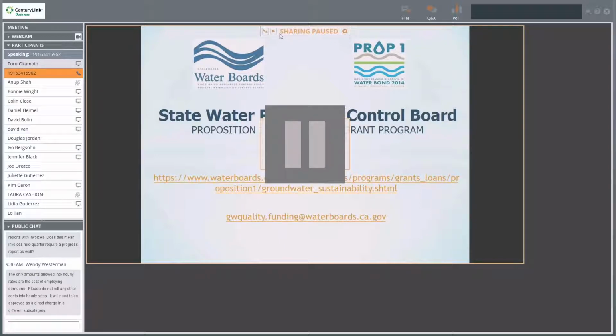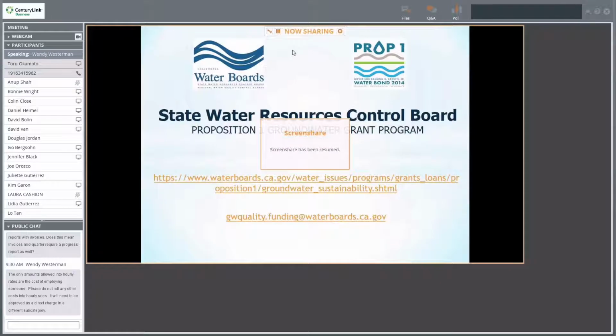You're going to roll your sub costs up, and you're not going to send us the subcontractor's detail like you would if you're the grantee. However, we ask you to make sure that your subcontractors know of the requirement. The auditors have the ability to go see them. So make sure that they're keeping track of their costs the same that you're keeping track of your costs. Just make sure that they're aware that they should have timesheets for their employees. They should be able to back up the costs that they're charging you. Now, it's not very often an auditor will go to a subcontractor, so it's very, very rare, but it's a possibility. So we like to tell them, make sure that you have your documentation. You may not have to submit it to us, but you need to keep it in-house.